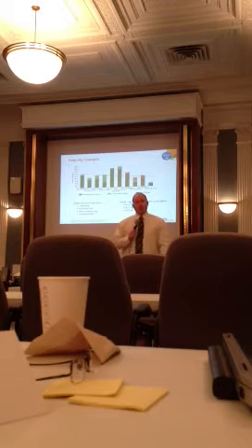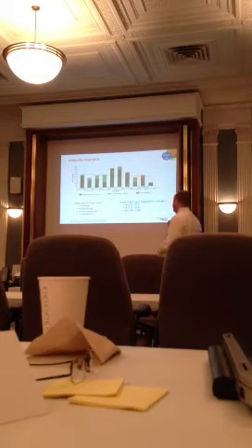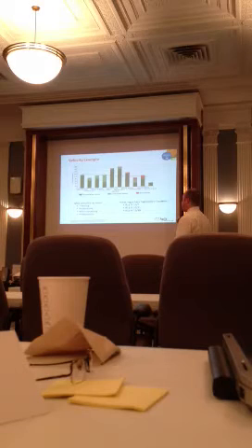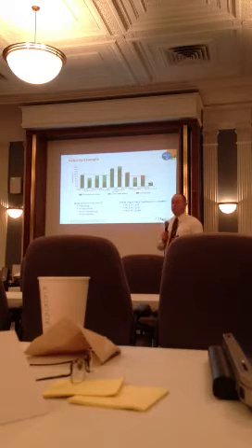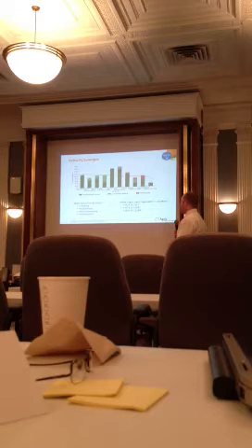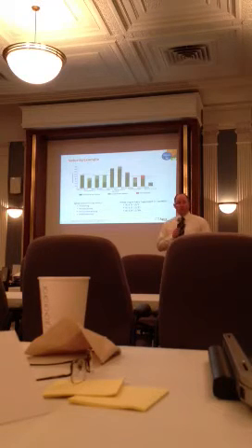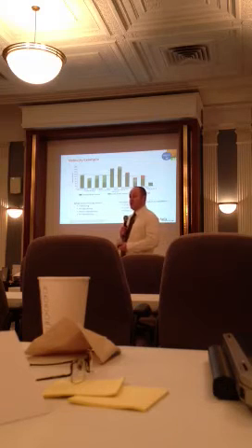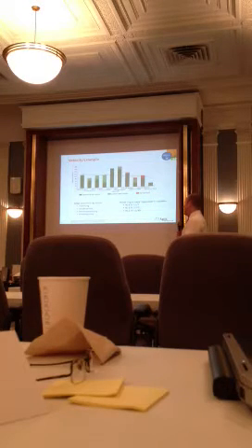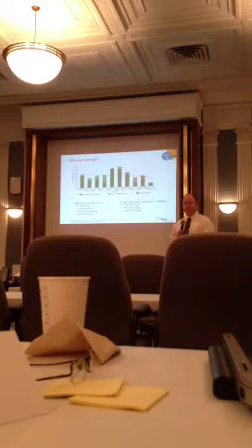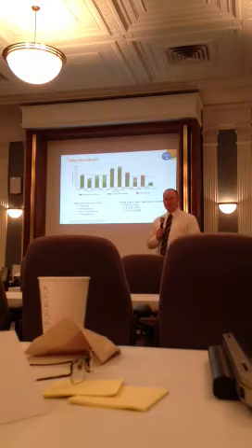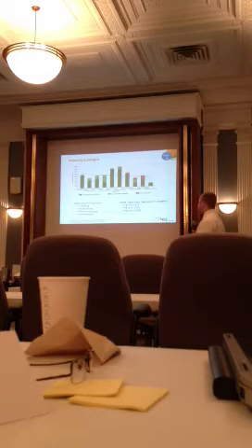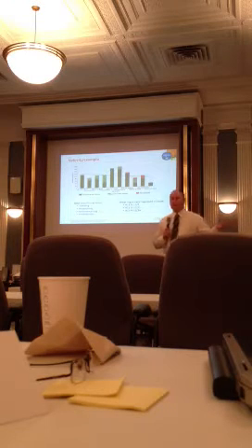That's what I mean. So you can see that when I used those 2 people from that Skill Factory Scrum team, our velocity went up to 155. But not only that, remember for the first couple of days of this iteration, we were doing this stuff, these small changes, right? So when I look at this next iteration, I was like, well, heck, we committed to 155 story points there and got them all accepted, 100% acceptance. And we did some work over here. At the beginning, I was like, clearly in the next iteration, we can commit to more work, right? So I let the team commit to 160 or 65, and I was wrong, right?